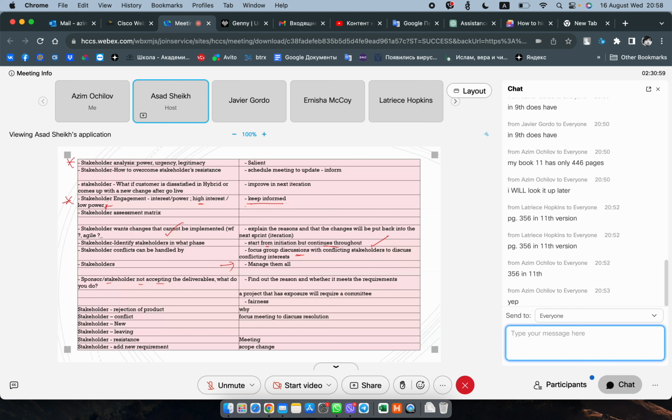So this kind of question can come up in the PMP. They can ask you what you do when you're validating and it doesn't meet the requirement, or doesn't meet their satisfaction. You ask them why, and then you go back and look at the requirements to see if the requirements were met or not met. And after that, you can do the impact analysis and those things that we mentioned.